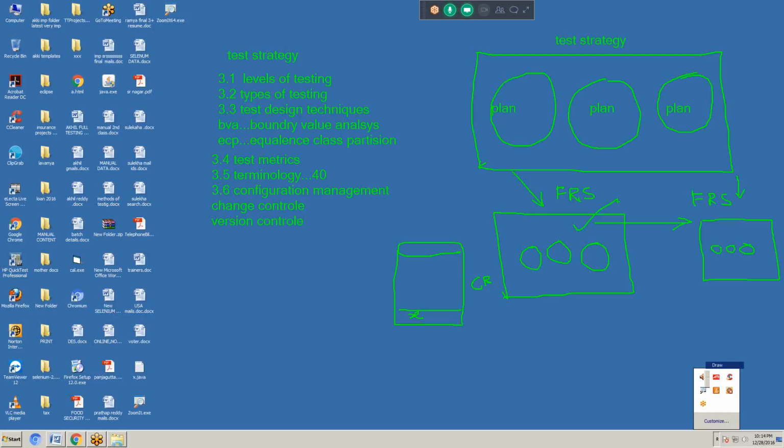First the customer gave two requirements, and after some days he wants three buttons in the application. He can add it; if it is possible, we can take the requirement. Each and every software company maintains a customer request document and a change request template. If it is not yet developed, then we will accept. But if it is already developed and we make changes, the remaining functionalities may be affected. At that time we will not accept.